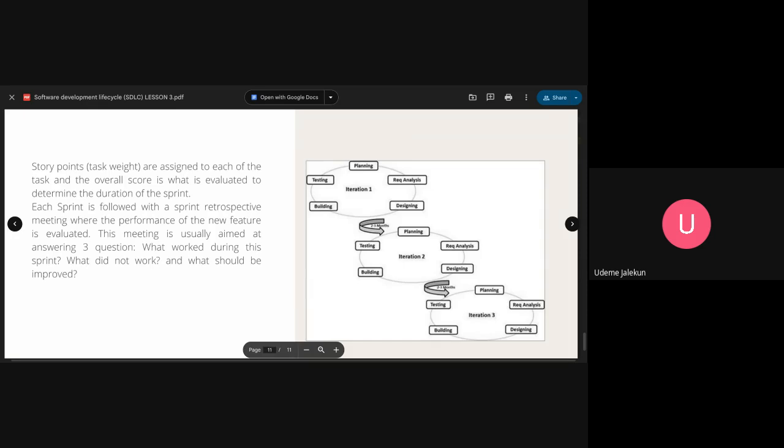Okay, let's say Esther was the first person. Juliana now has this same idea and decides, instead of waiting to build all 5 features and test all of them before we deploy, let's do it iteratively, in iterations. So let's split it. Sign up: how long will it take us? Let's use sprint 1 to do sign up. That's 3 weeks. Immediately we have done sign up and login, deploy it. Next phase, image upload.